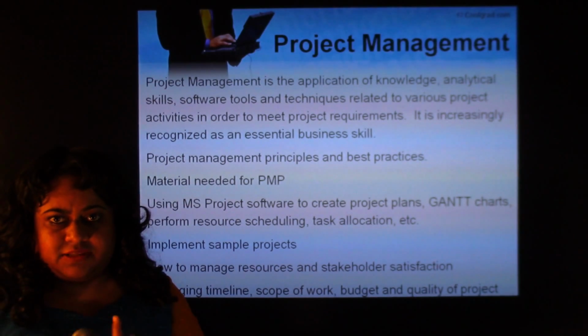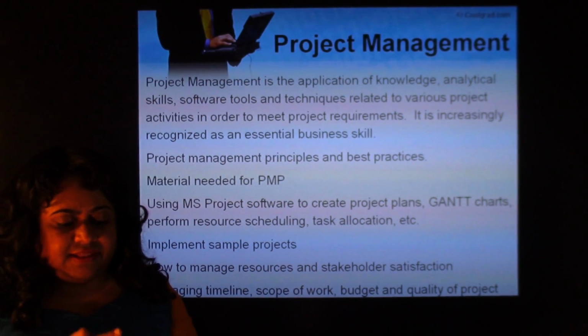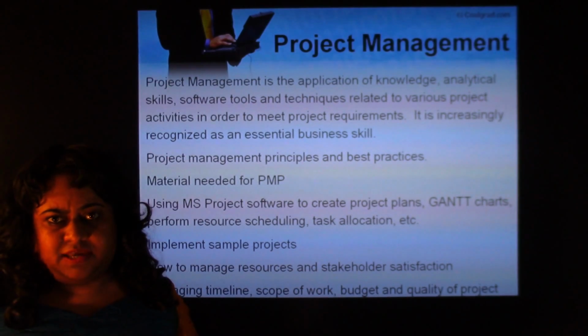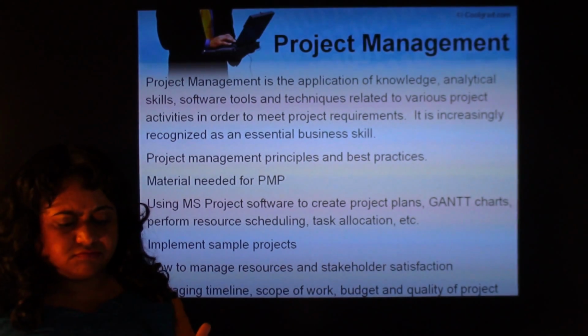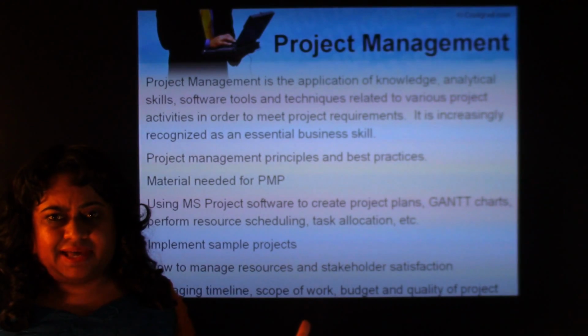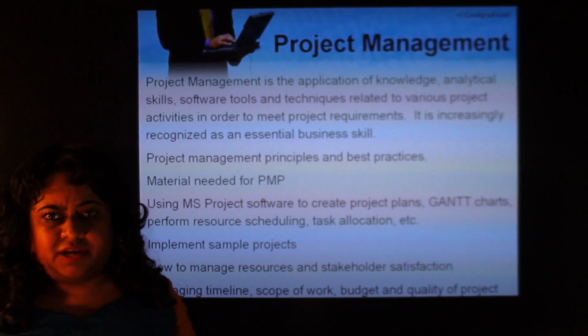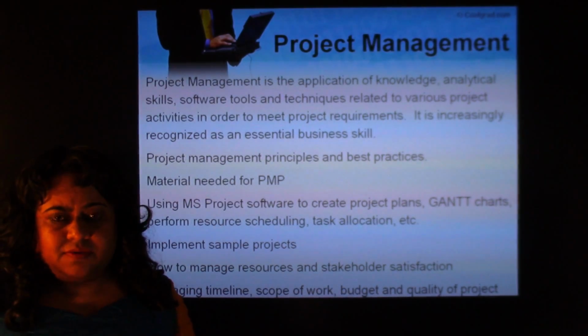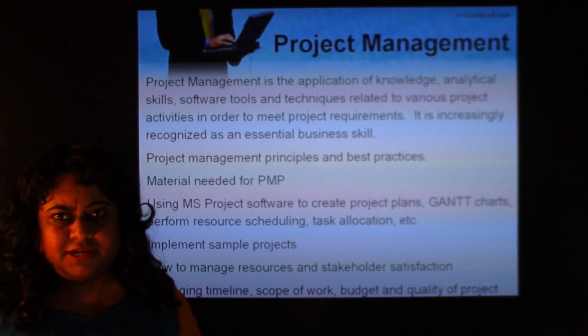So one is the budget, then the resources, and then the timeline. You have to know what work can be done in parallel and what has to be done sequentially. Usually in an agile project we prepare the sprint plan. So we determine how many sprints are required, how many sprints can be done in parallel, and we decide how much time this project needs to be executed. And we prepare the project timeline.